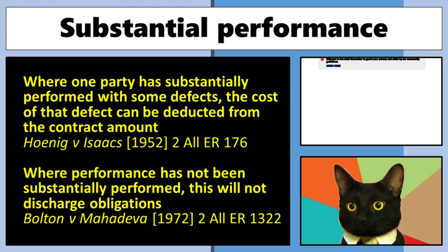And usually these situations happen, by the way, where one side kind of begrudgingly accepts the work that's been done. This can happen in situations where one side has left or abandoned or gone away. So 98% of the work is done. Courts are going to consider that to be discharged through performance, but you can deduct, just as a practical rule, the amount required to fix it or finish it. That's not going to happen if it's a substantial amount.